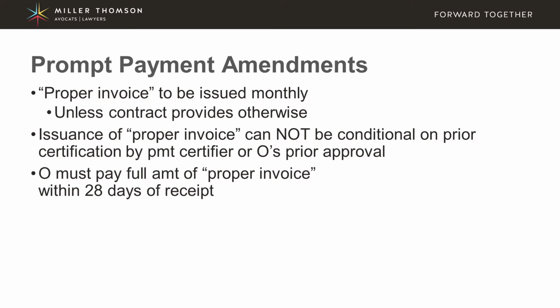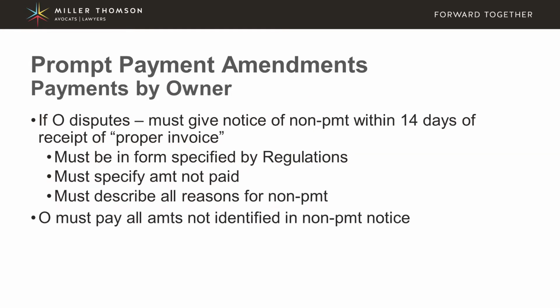or by the owner. And one of these serious obligations that I mentioned with respect to a proper invoice is that once the owner receives that proper invoice, they have 28 days to pay that invoice. Now, the owner does have recourse if there are issues with the invoice. So if the owner disputes the entire invoice or portions of the invoice, they can give a notice of non-payment within 14 days of receipt of this proper invoice.